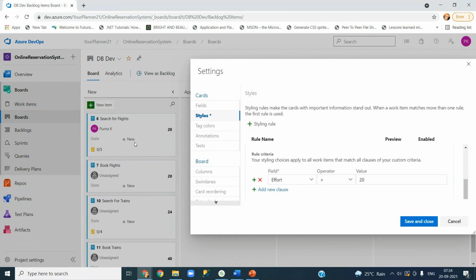Such kind of estimation they might have, but during our sprint discussion, somebody might have given 60, 70 as well. That means overwork. Let us say somebody gave 90 hours as an estimation for this product backlog item. Definitely that is a very high number of hours, because each person's availability in each sprint is 80 hours only. If somebody gave 90 hours, your project manager needs to add some other person to that product backlog item. Otherwise it cannot be executed, because the total available hours are 80 hours for any person in the team. So he may want to track such things as well.